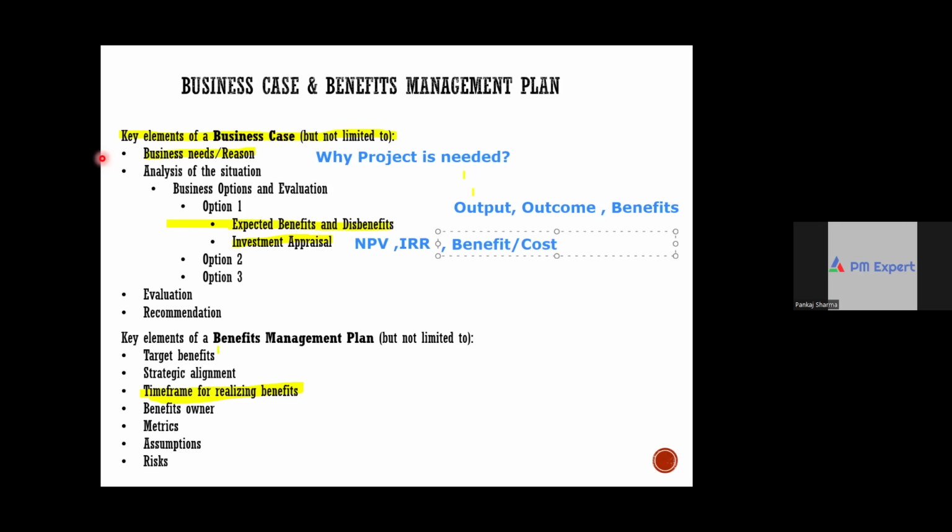Right. For example, governments in any country spend a lot on research projects, right? Research projects in the long run are important to uplift the whole society, the whole country as such. Now, see, research 1, research 2, research 3. Obviously, research is not done for profitability reasons. So what you do is see the impact, the ratio of benefit and the cost. And these are non-financial benefits, right? Whichever option has a better BCR, benefit to cost ratio, you go with that.